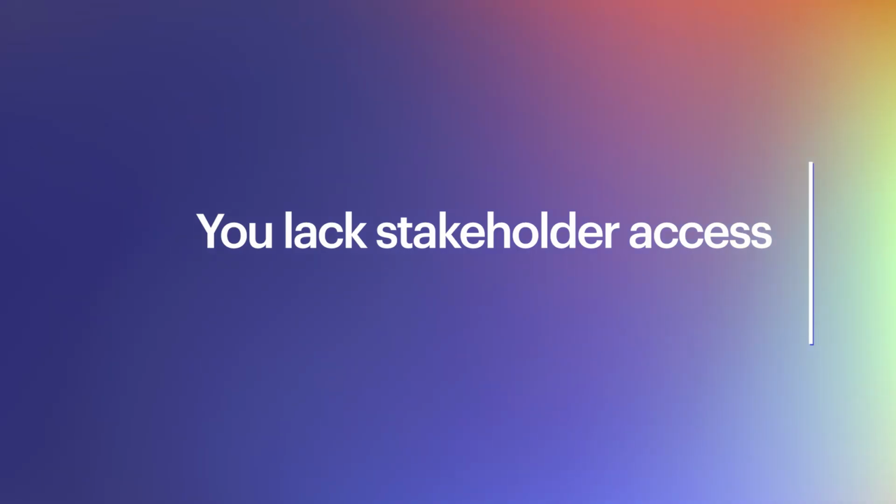Sometimes a client limits your access to their team, leaving you with only 1 to 2 people to talk to on the client side. If you can't pull a diverse group of stakeholders together from both sides, it's unlikely you'll be able to build a comprehensive and effective SWOT matrix.